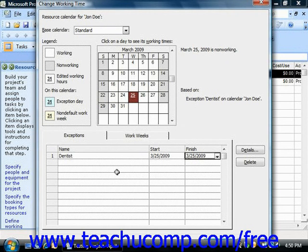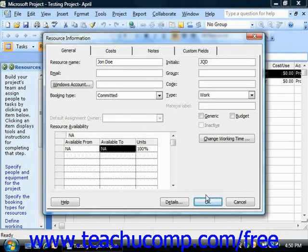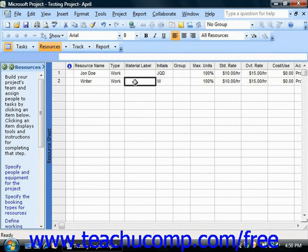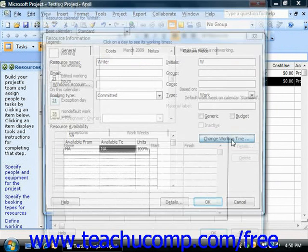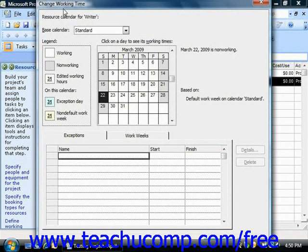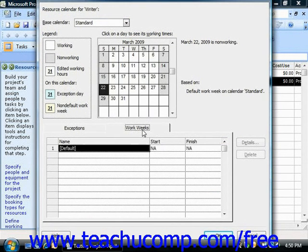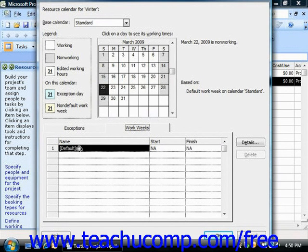If you need to enter a custom work week for the selected resource, you can also do that in the Change Working Time dialog box. Click the Work Weeks tab. Note that the value of Default is shown within the first row on this tab. This value indicates that the default working time from the base calendar selected is to be used for task scheduling for this work resource.